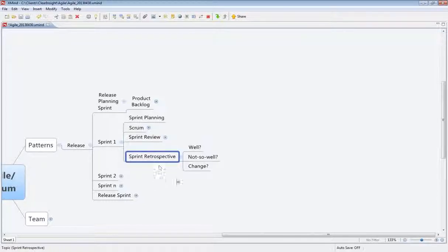And that's the same approach here as in a sprint retrospective. At the end of every sprint, we ask 3 simple questions. What did we do well? What did we do not so well? And what do we want to change? And the idea here is, traditionally, you do a project post-mortem after a project's been around for 6 months, a year, 3 years, and you look back and you say, oh man, a year ago X, Y, Z happened, and wow, we ended up paying for that for the next 6 months. And at that point, unfortunately, it's just academic. There's not much you can do with that information to be successful.